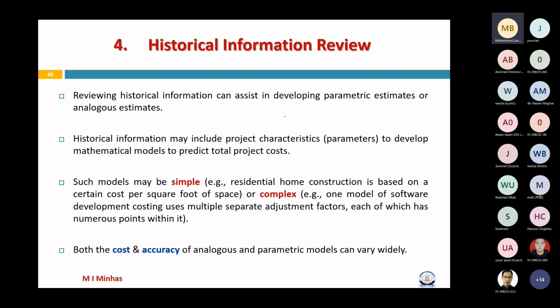Now, I would see that previously, another project manager in the organization constructed a very similar project just 2 months back for, let's say, 9 million. Why is my cost coming so high? You need to compare this, correct?